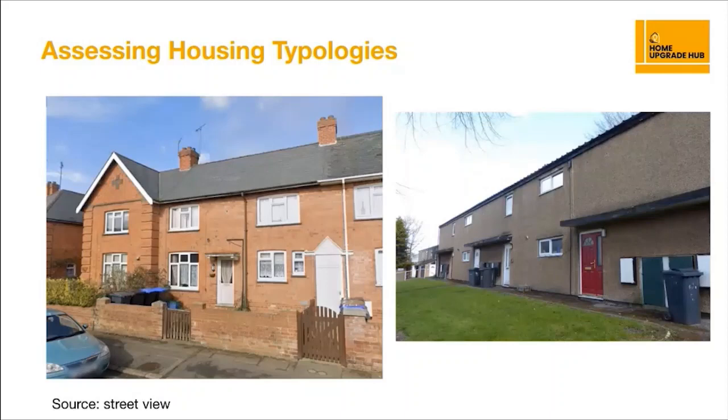So one of the first tasks was to analyse the housing for each project. So demonstrator projects, they did have a fairly ambitious space heating demand target. So this was about understanding how could that money be spent effectively, what measures were cost effective whilst avoiding risks such as localised condensation, and to what extent could homes be grouped together, were there ones with similar or the same forms and features as a way of streamlining that design process.